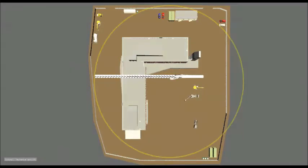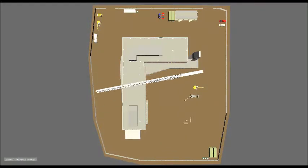The yellow circle shows the crane's reach over our project. The crane is in perfect position to pick up the laydown material and install it to the furthest part of the building.